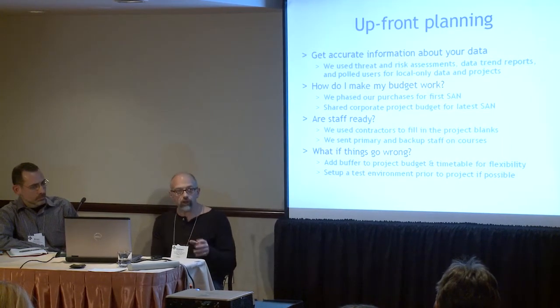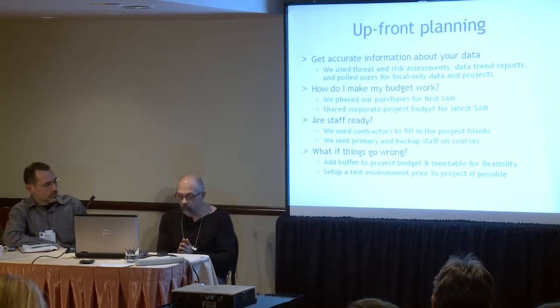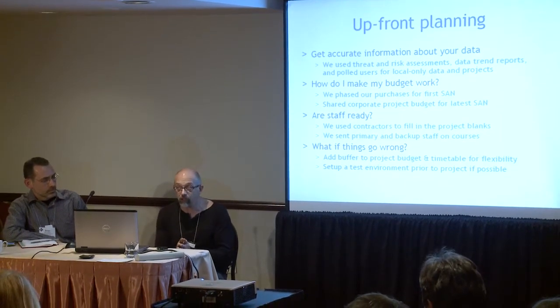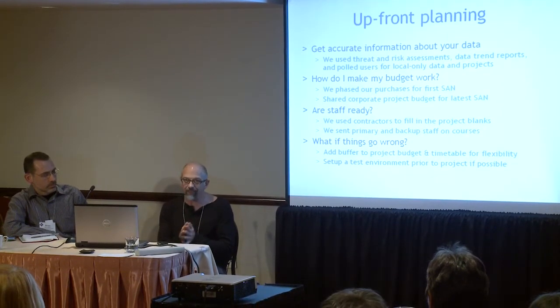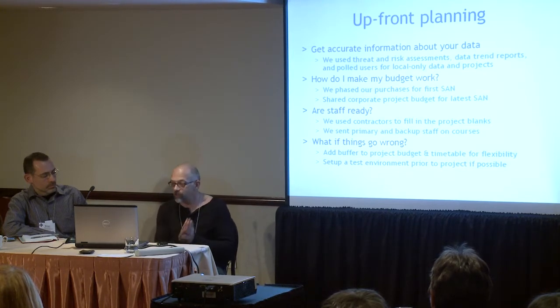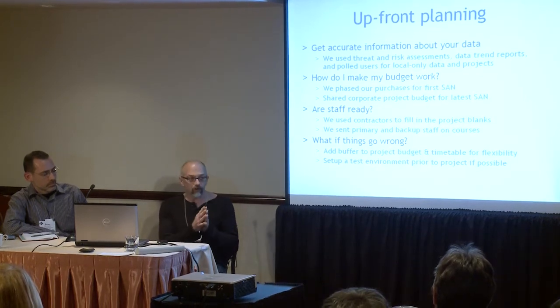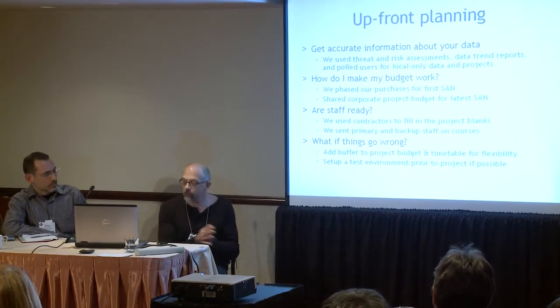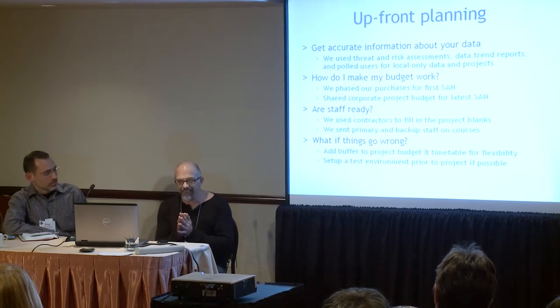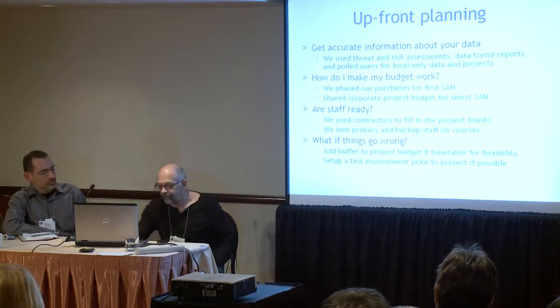The other thing we did is we made sure that we sent people out to registered courses that we knew would give them the information to handle most situations, even if we still had to go back to contractors for something later on. But don't do it just for your primary staff. Make sure that people that back the positions up also have the same training so that they can be as effective in the position if there's an absentee.